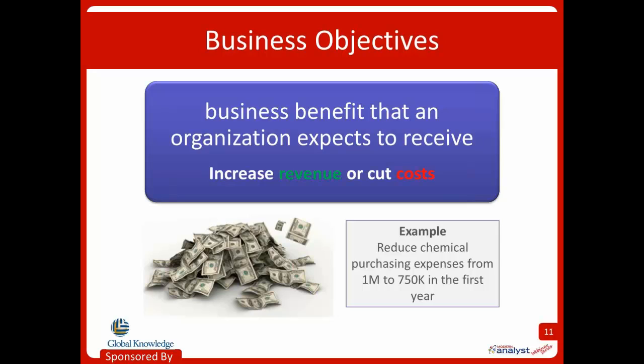But the reality is that your business stakeholders do not care if there's 7 systems or 1 system. There's got to be some kind of a dollar benefit associated with it for you to take on that project, for them to actually feel like, okay, there's a business objective here. So you might have an objective that relates to cutting costs by a certain number of dollars, and that would be a valid reason to do it.